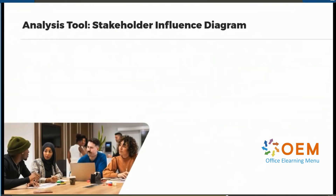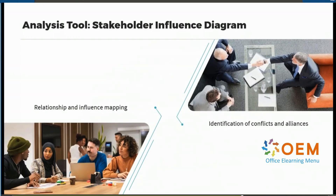Let's shift our focus to another useful analysis tool: the stakeholder influence diagram. This tool helps you understand the relationships and influence dynamics between stakeholders. By mapping out these connections, you can identify potential conflicts and alliances. For example, in a healthcare project, you might find that doctors and nurses have a strong influence on each other, while patients have less direct influence. Understanding these dynamics allows you to develop strategies to manage stakeholder interactions and ensure smooth project progress.